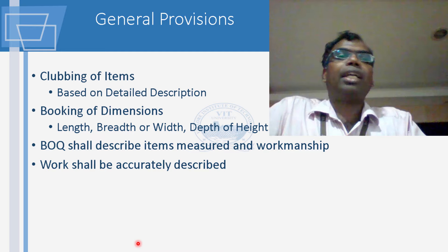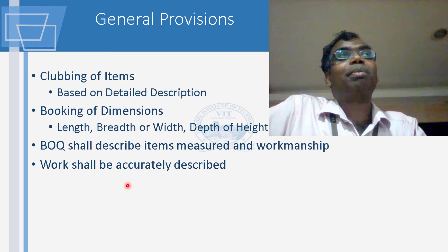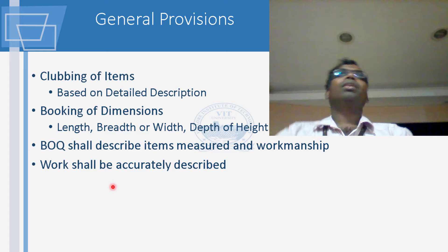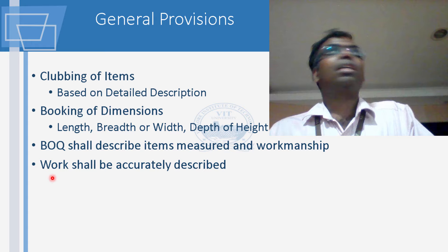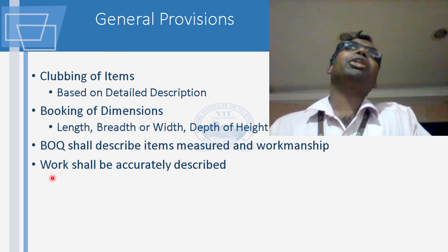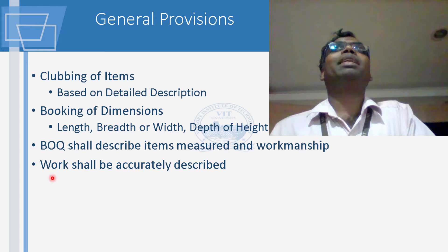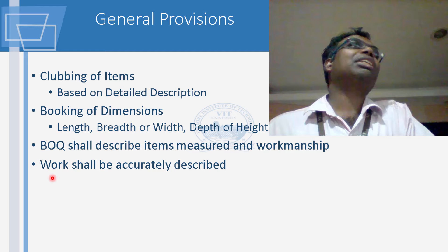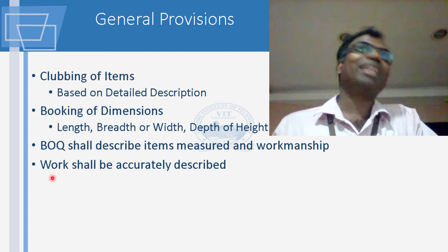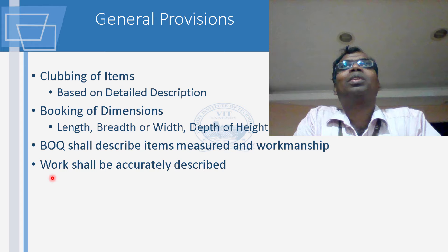The bill of quantities specifies how the work has been done and explicitly records everything. For instance, for backfilling — backfilling will be done in layers of less than 150 mm. You compact it and a minimum of three layers are done. Have you heard this description anywhere? You should use three layers — this is also in your soil mechanics course. Try to relate what you have studied in theory to the field of construction.